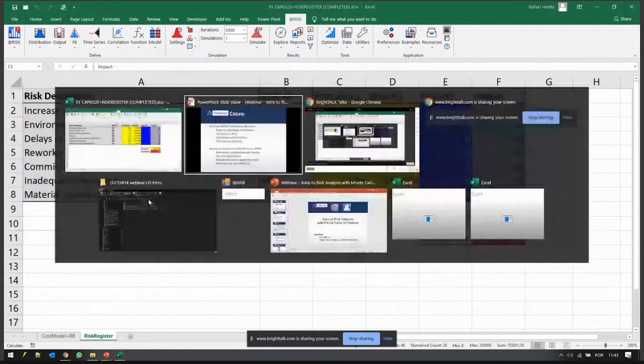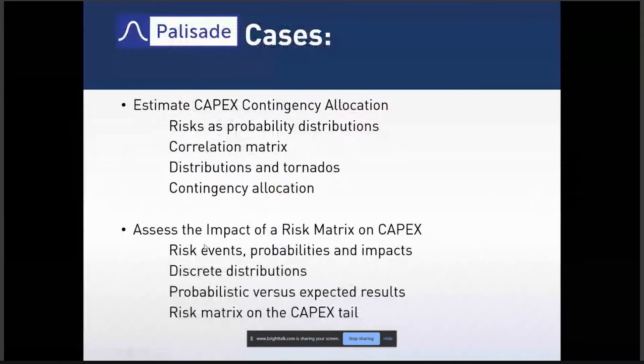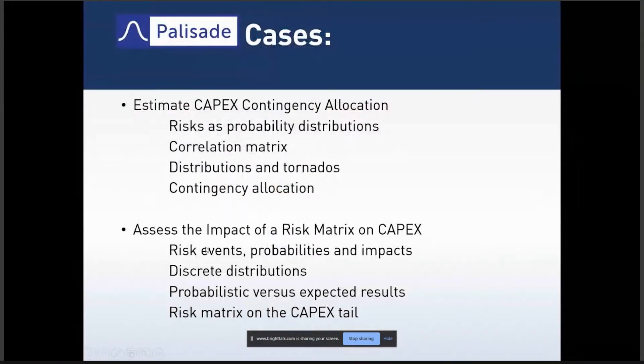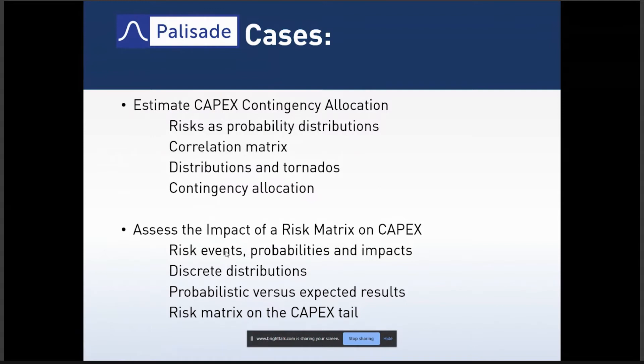We can now map these external risks, these events that may occur or not. They are of a different nature - they're not part of your plan, they're not part of what you're doing, but they may occur. If you're modeling a production curve or sales of your product, you might be talking about supply chain disruptions or some kind of bankruptcy of your retailer and then you're not selling anymore for a while. Risk events like that that are rare but they have a huge impact on your profitability, on your project.